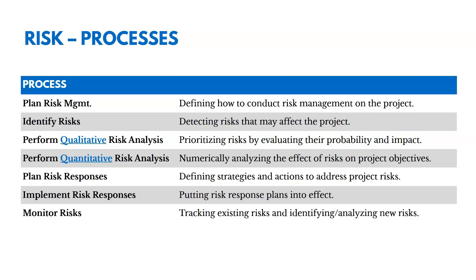After planning risk management, we identify risks — detecting risks that may affect the project. Then we perform qualitative and quantitative analysis. Qualitative analysis is prioritizing risks by evaluating their probability and impact. Probability is how likely they are to happen, and impact is how bad it will be if they do. Quantitative analysis is numerical analysis — analyzing the cost impact in dollars and the time impact in days.